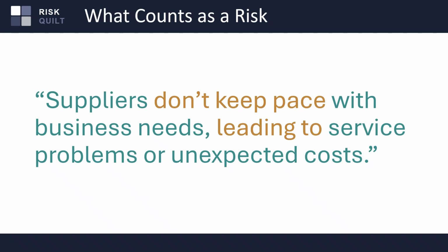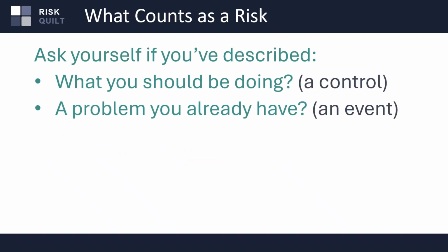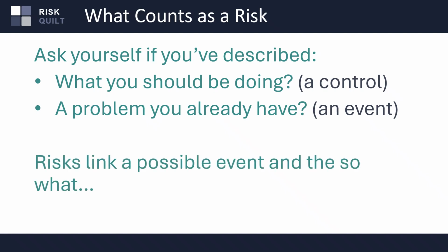So it's worth a quick check. If what you have written is a thing you should be doing, it's probably a control. If it describes a problem you're already having, that's not a risk either, that's an event. The risk is how we put them together.